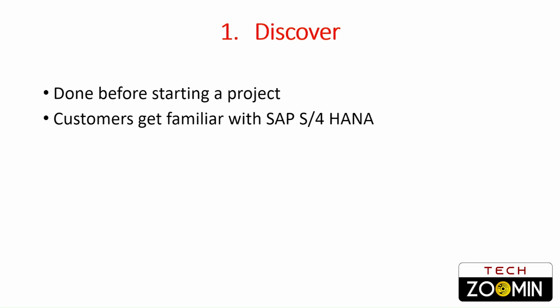So the first one is the discover phase. The discover phase is something which happens before you start working on the project. In this phase, the customer gets familiar with SAP S4HANA. Before starting the project to implement SAP S4HANA, the customer will understand what is new in SAP S4HANA, why we should go for SAP S4HANA, and identify whether this implementation impacts any existing business process or not.